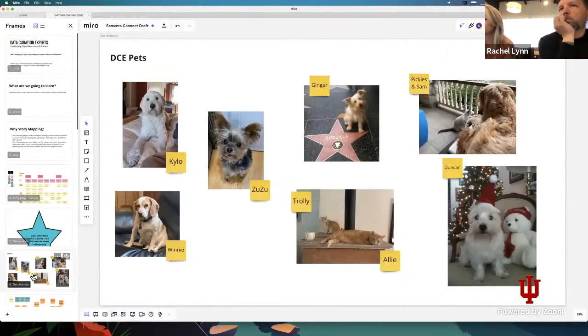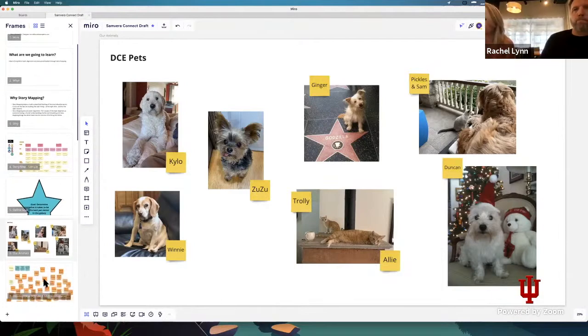Yours will be more detailed and focused on the user. For example, our goal is to build out faceted search for our digital repository so that our students and researchers can more easily find what they need. So you get the picture that we're really trying to be a little bit more detailed about what we're building. So we want to define what that is. This might be that we're going to story map an entire project, or we're going to just focus on a key feature or a set of features.